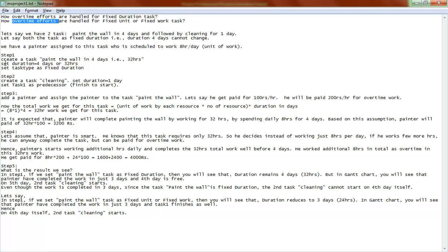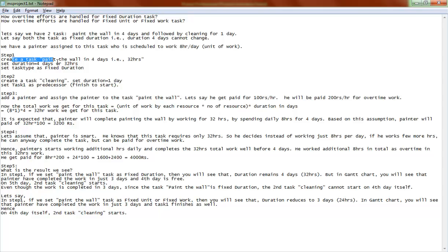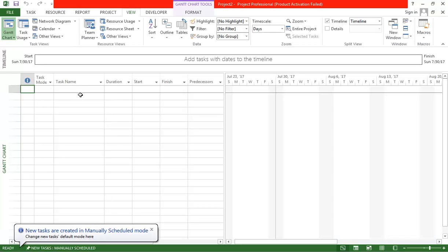Step one: create a task 'Paint the Wall' with a duration of four days and task type set to fixed duration. Step two: create a second task called 'Cleaning' with a duration of one day, and ensure that the cleaning task starts automatically after the paint the wall task is complete. These are the two steps we will now do in Microsoft Project.